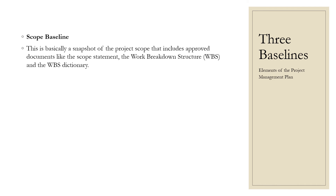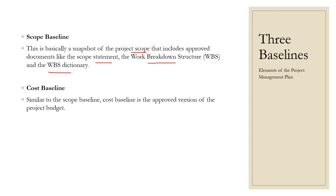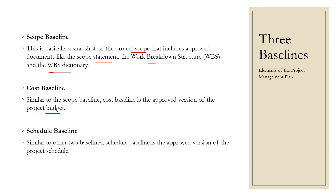The scope baseline is the snapshot of the approved project scope, and it contains three documents: the scope statement, the work breakdown structure (WBS), and the WBS dictionary. The cost baseline is the approved version of the project budget — how much budget has been approved for your project. The schedule baseline is the approved version of the project schedule — whatever schedule has been approved by the project team. These three baselines are all part of the project management plan.